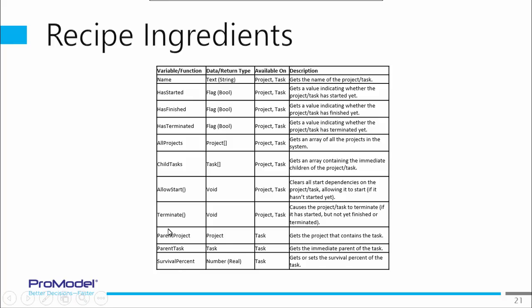I can manipulate the survival, because maybe I want to derive survival based upon information in the past. Another example that we've heard from our customer base is when I do a certain type of task more than once, I learn from it and my durations get lower. And that would be something very easy to do with recipes, because we could just increment a variable that says 1, 2, 3, every time you do something, whatever that is, you increment it on the finish event, and then you could have that be a multiplier onto the duration. And then now we're actually decrementing the duration over time.